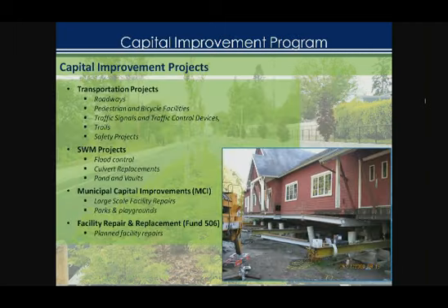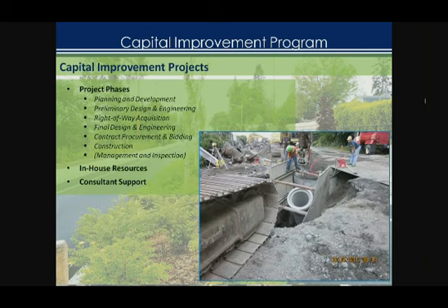Quickly, the capital improvement program: we've got several different funds that we manage: transportation projects, surface water management projects, municipal capital projects, and our facility repair and replacement fund. All these projects have different phases that we work through: planning and preliminary design, right of way acquisition, final design engineering, and contract procurement to bidding. And we have to make sure it's built right through construction management and inspection. To the extent we can, we will do as much of that work with in-house staff resources, and there's a balance there based on the size of the project and other work that's going on. For some of the bigger projects, we use consultant support.